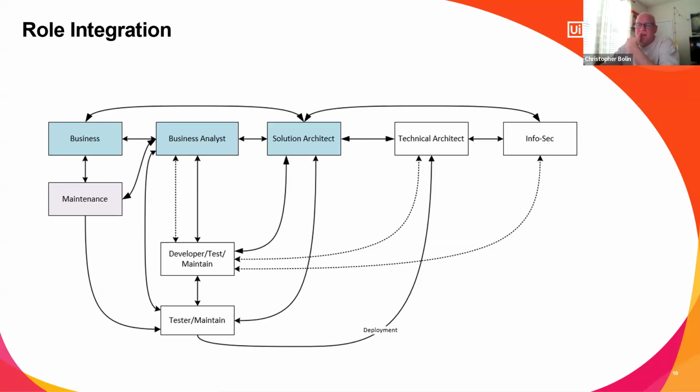Your developers maintain a few roles other than developing, but it can be a limited role in UAT and hypercare, dependent only upon failures or missing the expectations of the original PDD. Not changes to that PDD, because remember, once you start building, you don't change the PDD anymore. Once that developer puts hands on the keyboard, that PDD is set, and changes are very hard to get through unless they are standard changes or emergency changes.